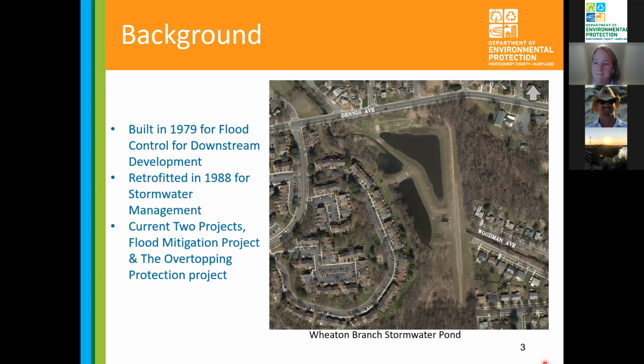That's a really good question. There will probably be some temporary winter rye or something like that put down to get some germination right from the get-go, even if it is in the winter. But that's a very good question. The permanent, we're probably going to be putting in more of a meadow mix than turf grass. It'll probably be a hardy meadow mix of seed, and a lot of that won't germinate. Like you said, it may take a year for some of it to germinate.